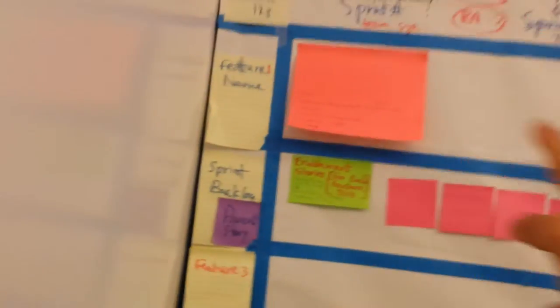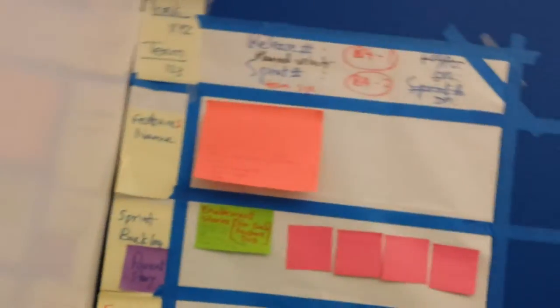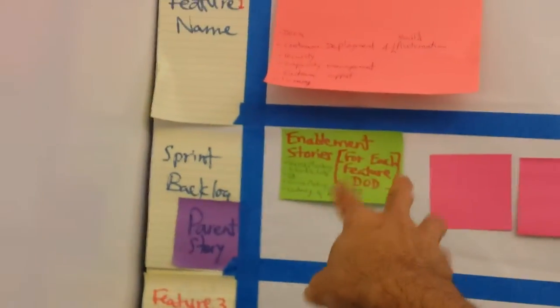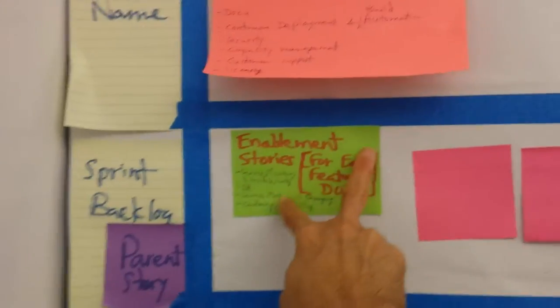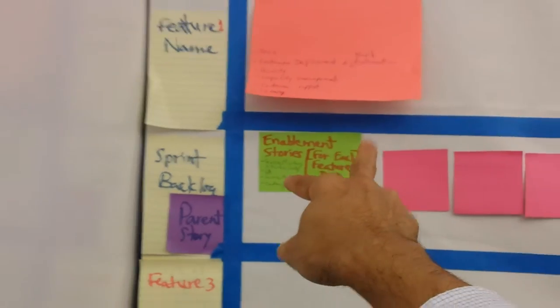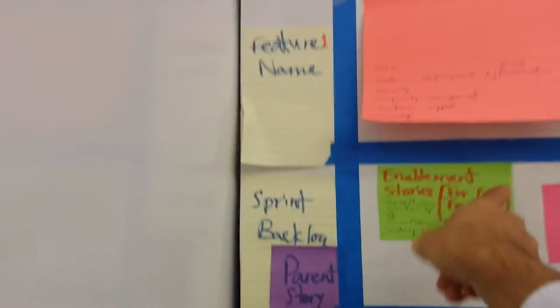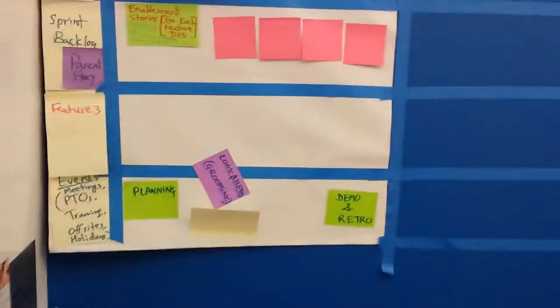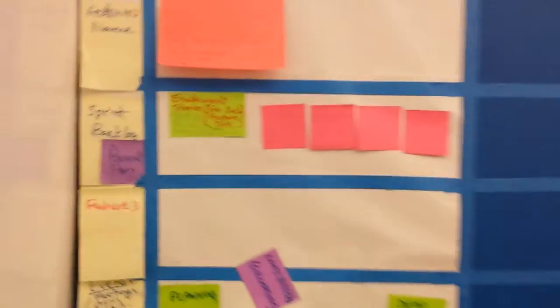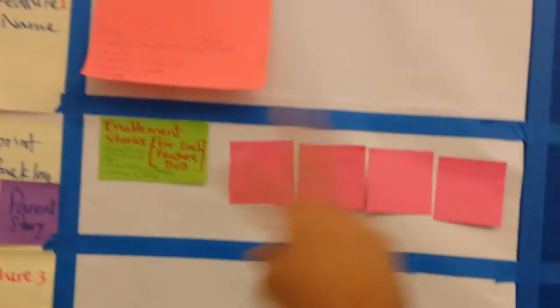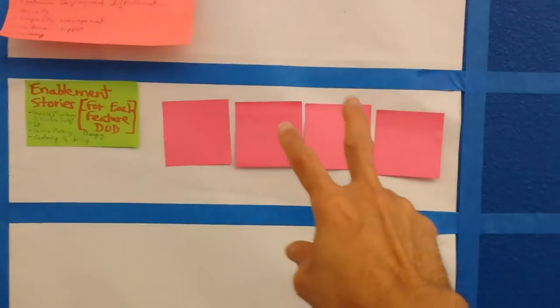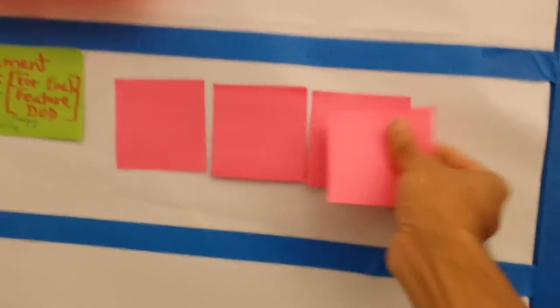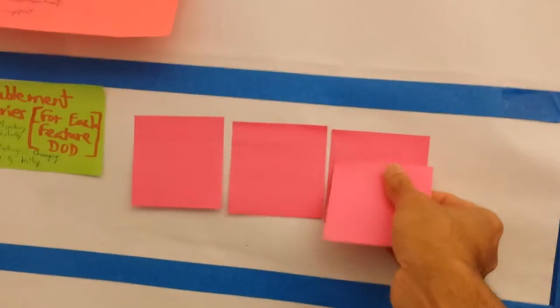What we're going to do now is take a feature, take all the decomposed stories, and put them across wherever we think fit, making sure that what totals up here is doable. It may happen that you might work on two features simultaneously, but you can see how many story cards we can have here—maybe six story cards. We're planning to use this two-inch by three-inch size for the story card.